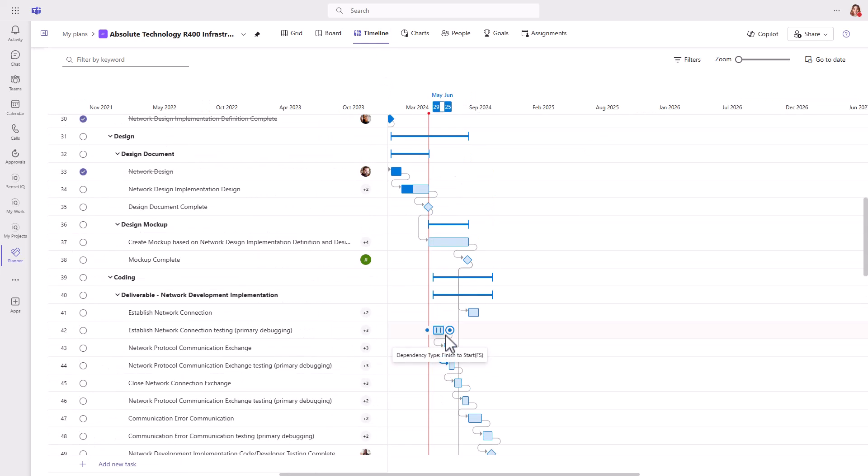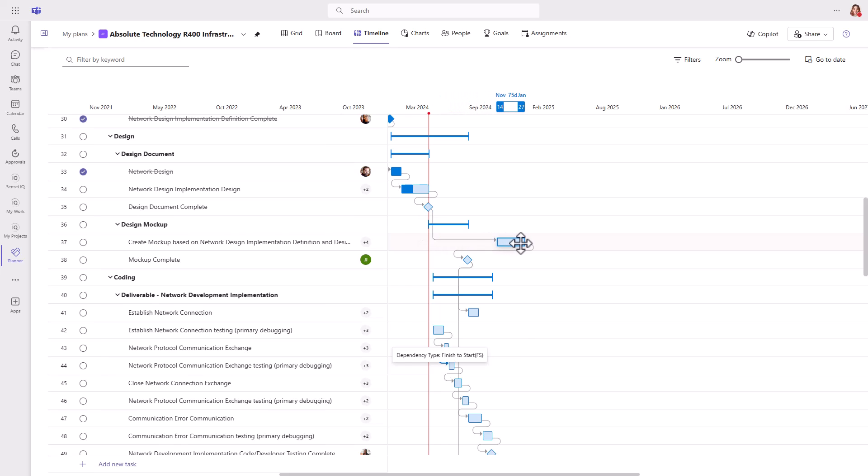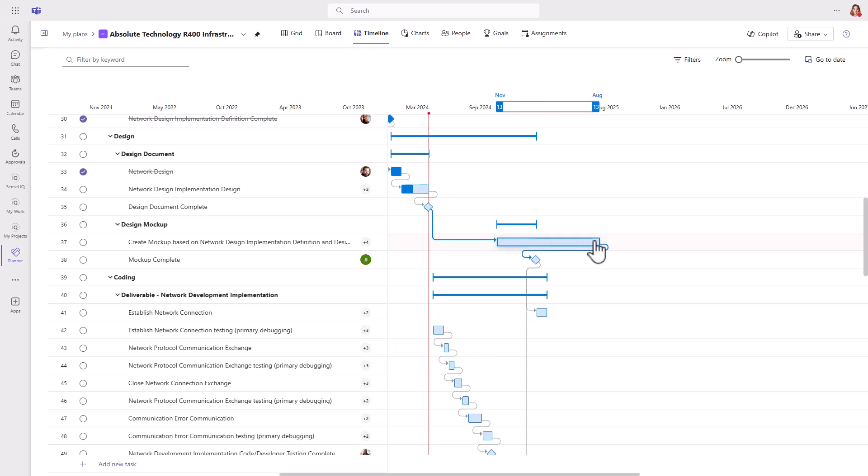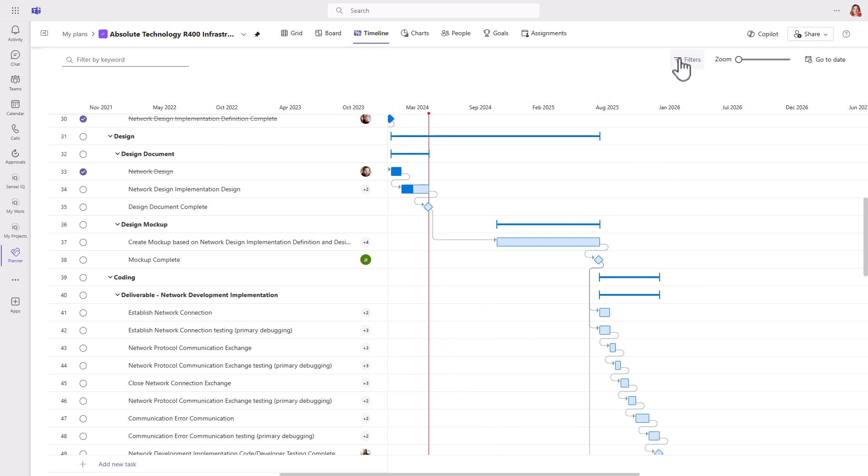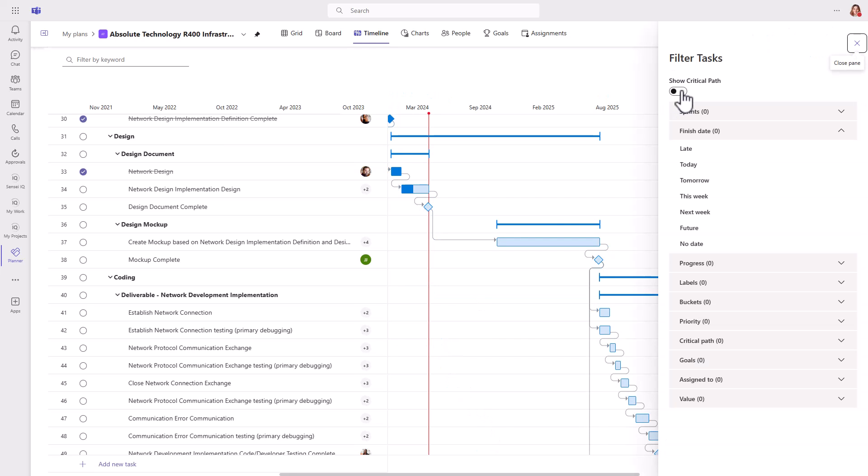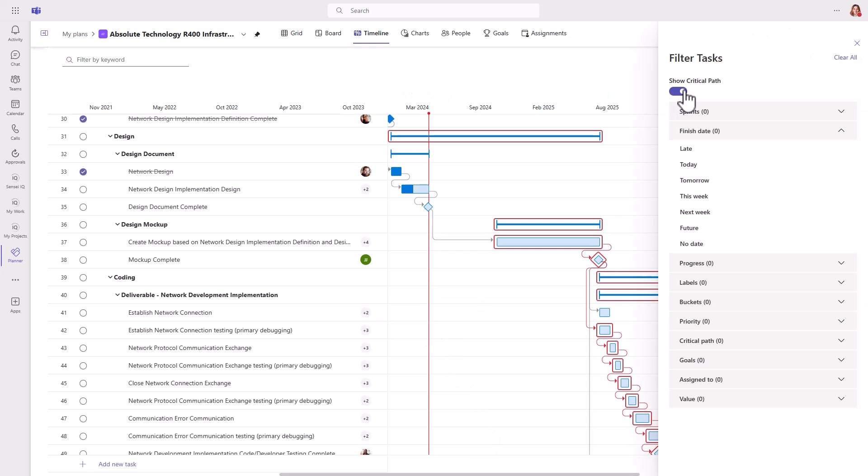With the interactive timeline view, you can visualize the work, then drag tasks to shift the dates, extend the duration of a task, create dependencies between tasks, and show the critical path of the project.